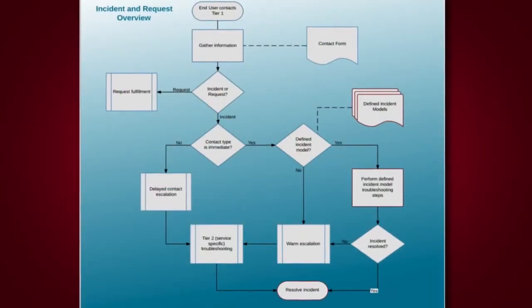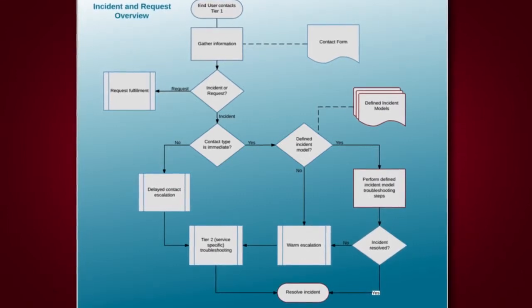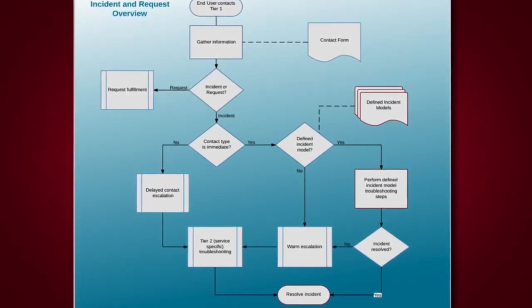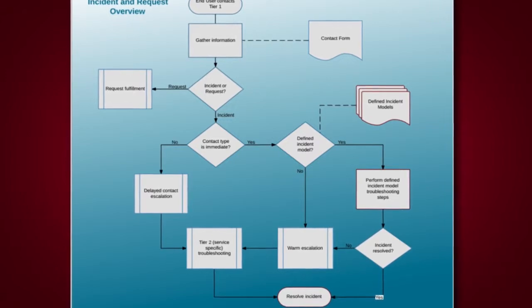So instead of a full year of activities where they could go off and work on something as big as enterprise architecture, the help desk consolidation, instead we gave them a 6-month project with a sponsor, and it would be something around standard operating procedures for the help desk, which would be necessary for a help desk consolidation, but something that the community could see pace and progress on during their time together.